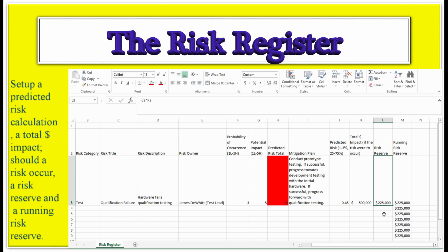So some organizations will look at the $500,000 and say, okay, you know what? We don't want any risk on this project. You tell me every risk and what the potential possible amounts are for each of those risks, and we'll set it aside. That way we know we'll stay within budget, and if any issues come up, then we have a reserve set aside to support those.